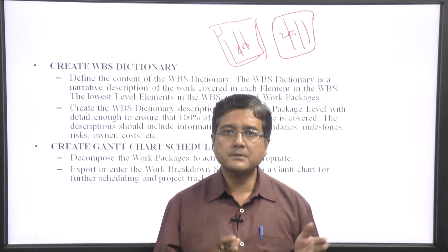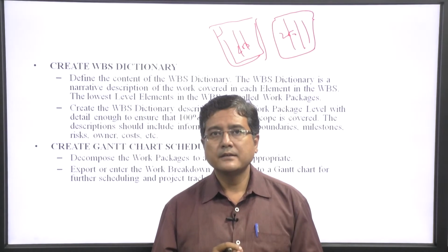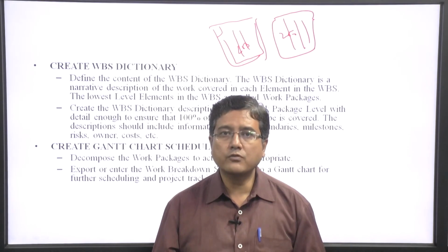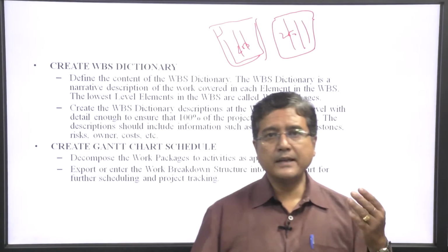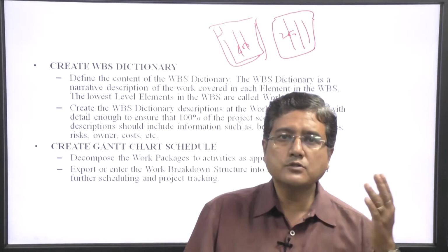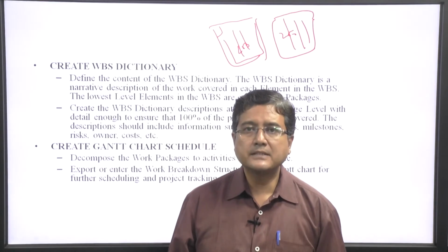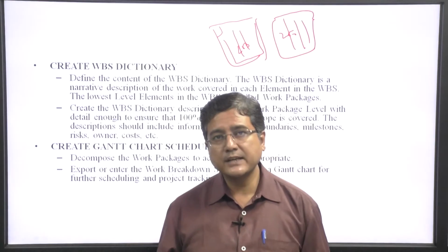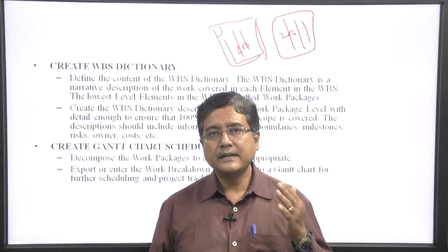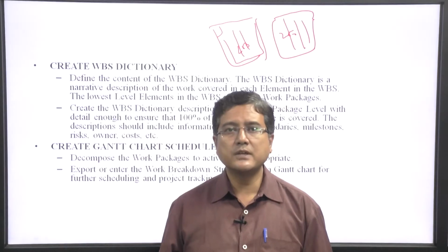I bring the systems, put them, connect with the LAN, connect with the power supply, and then install the software. I break these things into various sequences. After installation of software, my system manager, my engineer, checks each and every computer's functioning, and if I feel that all the computer systems are functioning okay, then I hand over the project to the client.